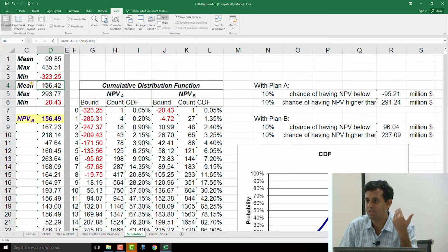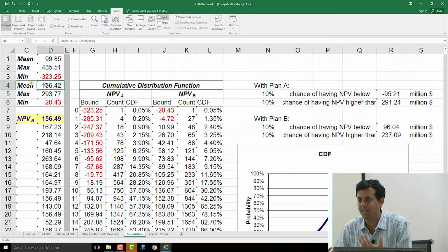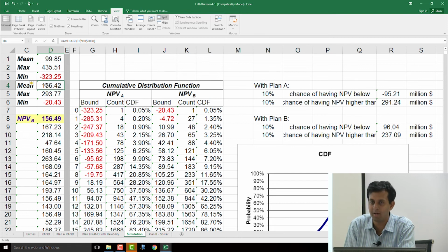So this is how this is modeled, and therefore when we do this analysis for infrastructure projects, we should try to see if we can do this kind of Monte Carlo simulation plus flexibility modeling, to really see, look, I can put in a number of different options, and then I can evaluate which option is actually giving me a large amount of value, and therefore what option I should design into the project. So you can do a lot of analysis to understand how the project should be designed, because this is just one option.